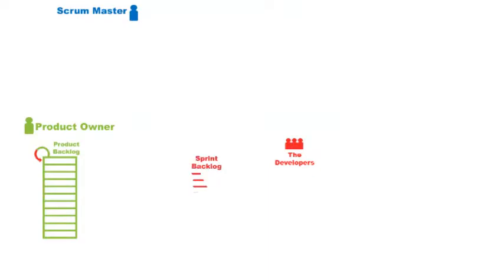The product backlog is a living artifact, describing the vision of the product through the product owner adding items to the backlog that will deliver the value expected from the product, and the developers refining the backlog items so that they can technically be delivered in a sprint. Where items are no longer needed, not likely to deliver the expected value, or this value can be delivered in another manner, then the product owner should remove them in order to maximise the value of the work not done.